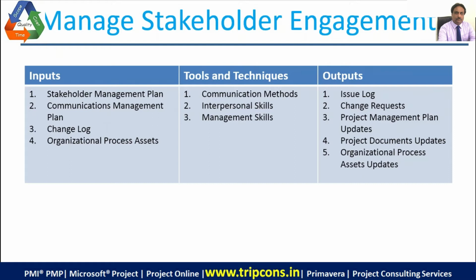Now, why do we need some change? Because as we are currently engaged with the stakeholders, we might observe that certain changes are required, and there are certain changes which occur due to the stakeholder status change that can happen during the course of the project. A person who might be in the monitoring quadrant can move up to keep informed, manage closely, or keep satisfied. So you have to make sure that you step up the engagement level to the right level, and that would be noticeable from the change log.